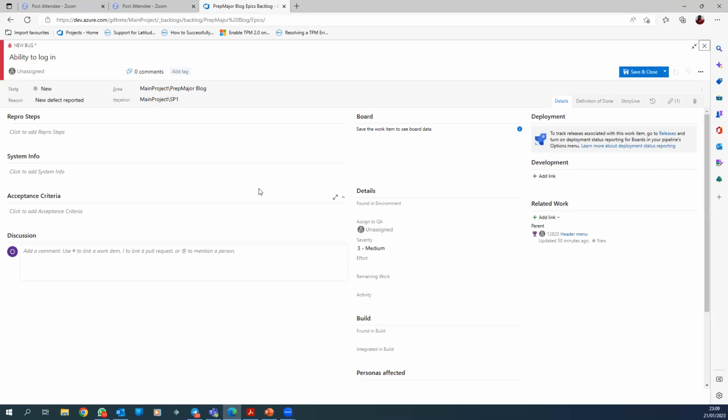Okay. The second one is, what happens if the daily stand-up is stretching beyond 15 minutes? That's the responsibility of the Scrum Master to make sure, because sometimes it stretches. If there was a big issue yesterday that we need to deal with, of course we have to talk about it, but sometimes it doesn't concern everybody in the team. So people will say, can we take this outside? Can I give you a separate call and we discuss it? Someone will say, let's take it to the parking lot. But that's the responsibility of the Scrum Master.